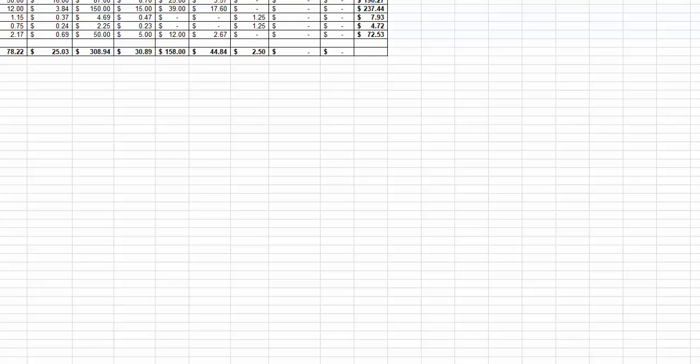Once you apply labor and equipment costs, those items become activities, but that's a different discussion. So anyway, these could be the items that I was just showing, the excavation items, the slab on grade items, okay? So notice they're quantified with a unit of measure, and here this U stands for unit cost, okay? So this is a CBS of just unit costs.